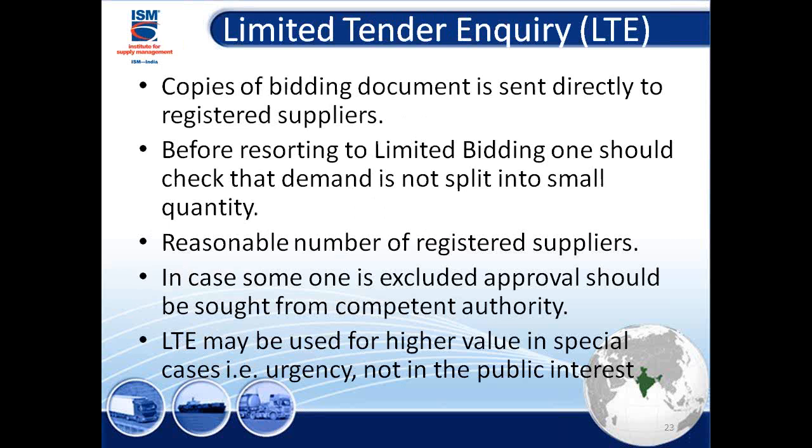Next come limited tender inquiries. Here we are sending the bidding document only to registered suppliers, approved suppliers. Before resorting to this, one should check that the demand is not split into small quantities. Sometimes the threshold for limited is lower. So sometimes, I know, we used to check it.